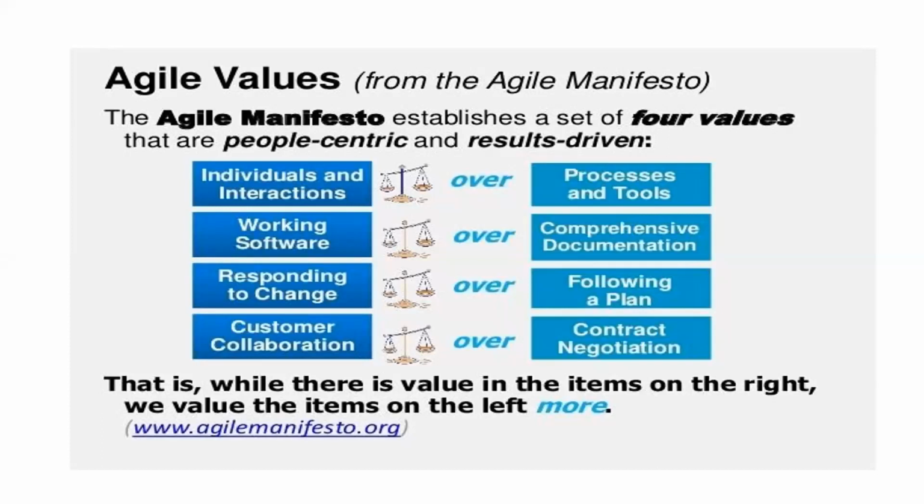That is why in Scrum, the owner of the product backlog is the product owner, not the development team. The product owner will arrange what needs to be done. Then from there, the team can pick the items they have the capability to do. During the sprint planning meeting, the product owner will be there. Everybody will be collaborating: yes, these are the first 10 items we can go on with now, based on the need of the customer. And at the end of the day, the PO can change the whole sprint: guys, let's stop this. A business need has changed. These are the items they now want delivered within the next 3 months. Let's focus on these items. And that is expected in Agile.